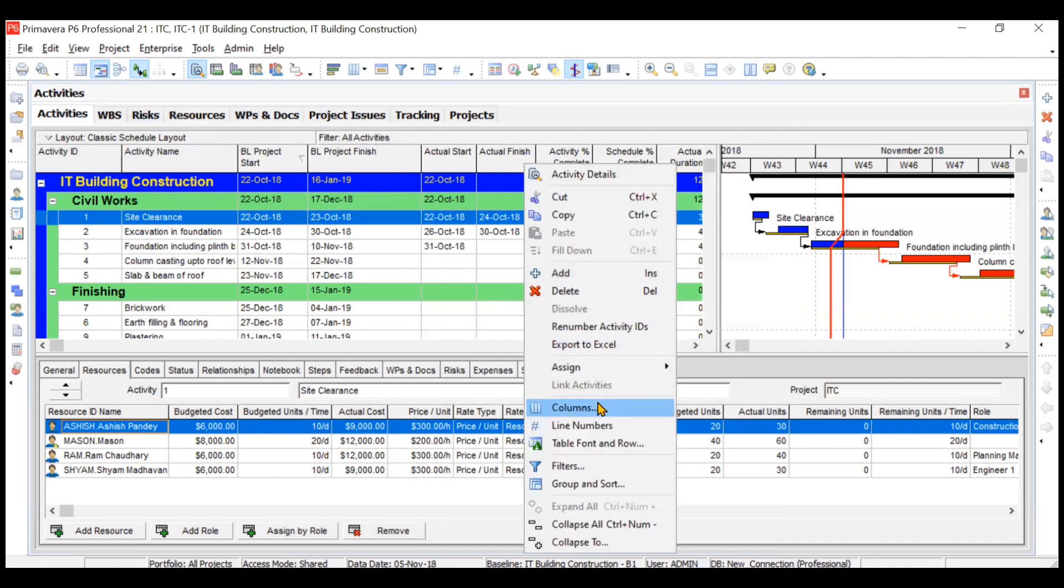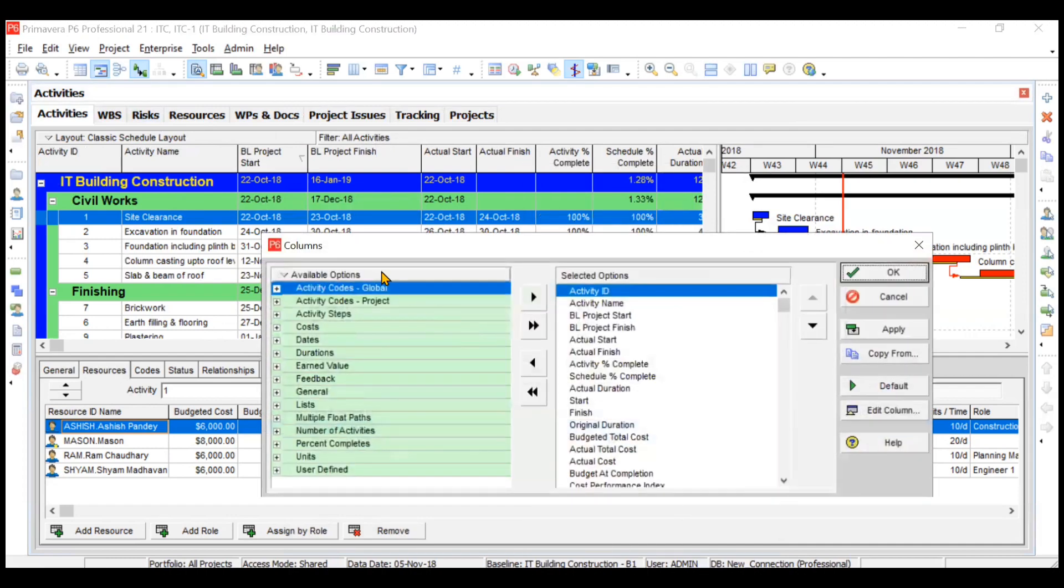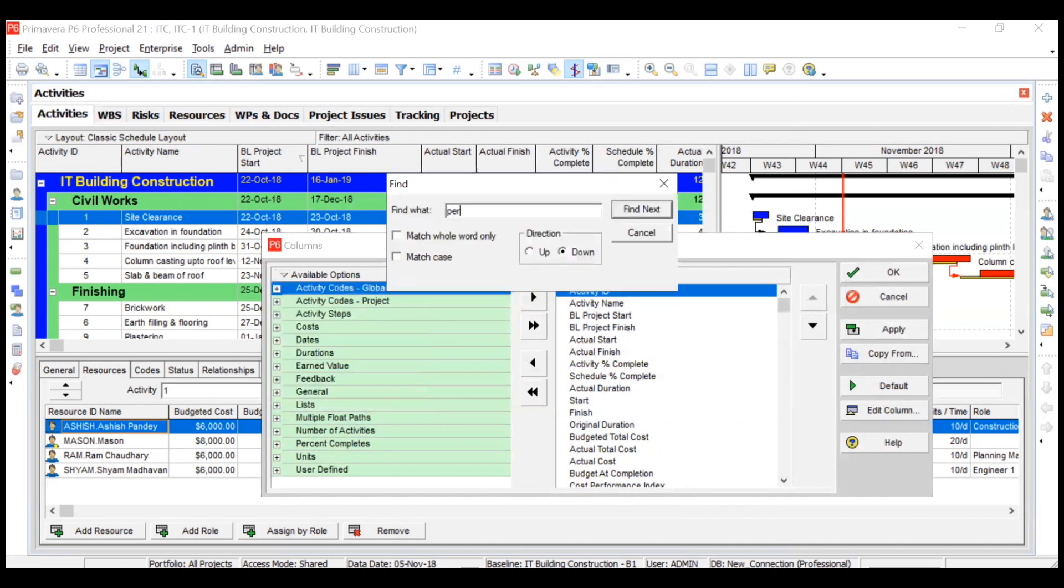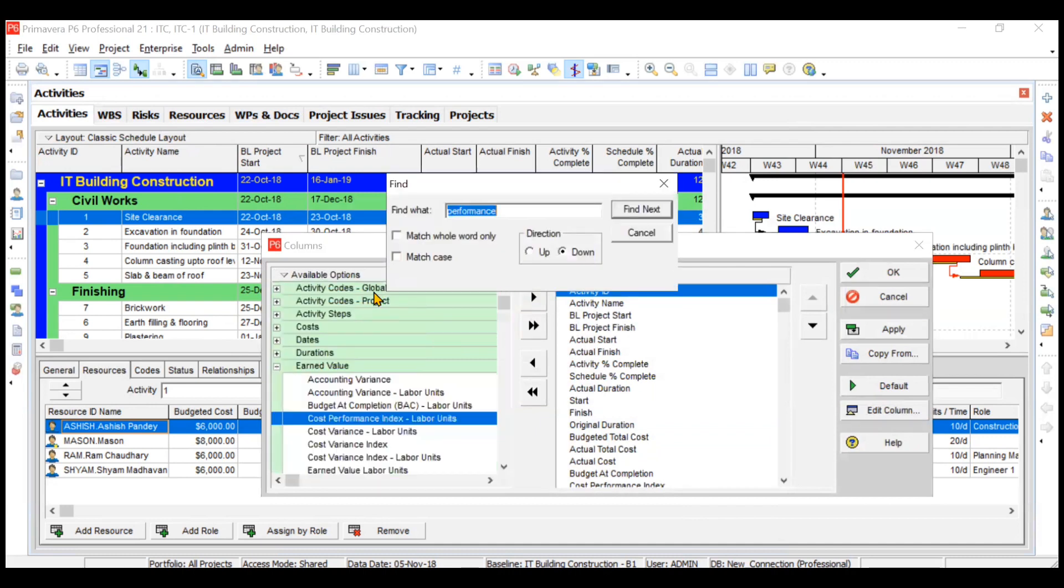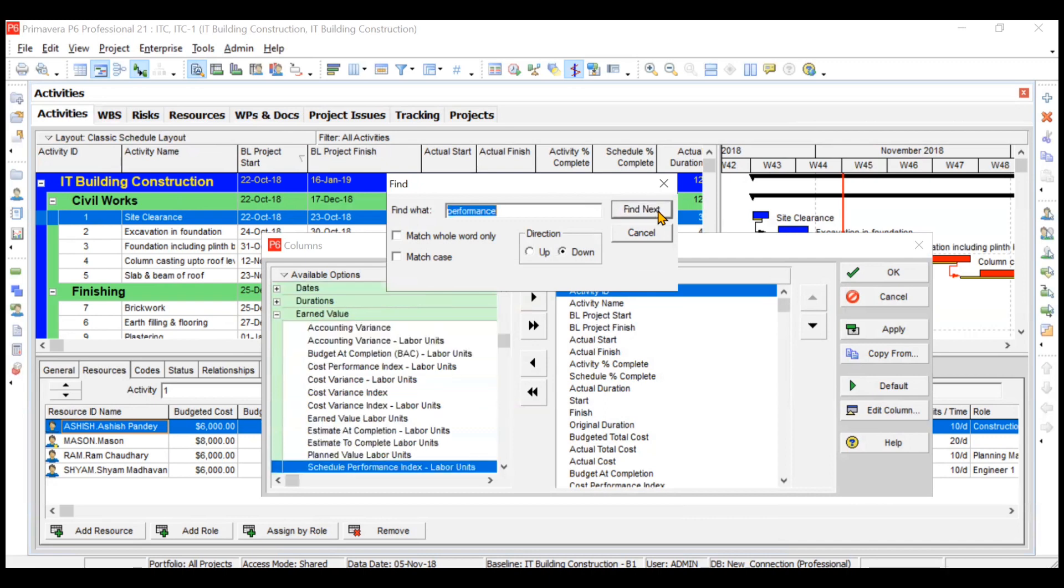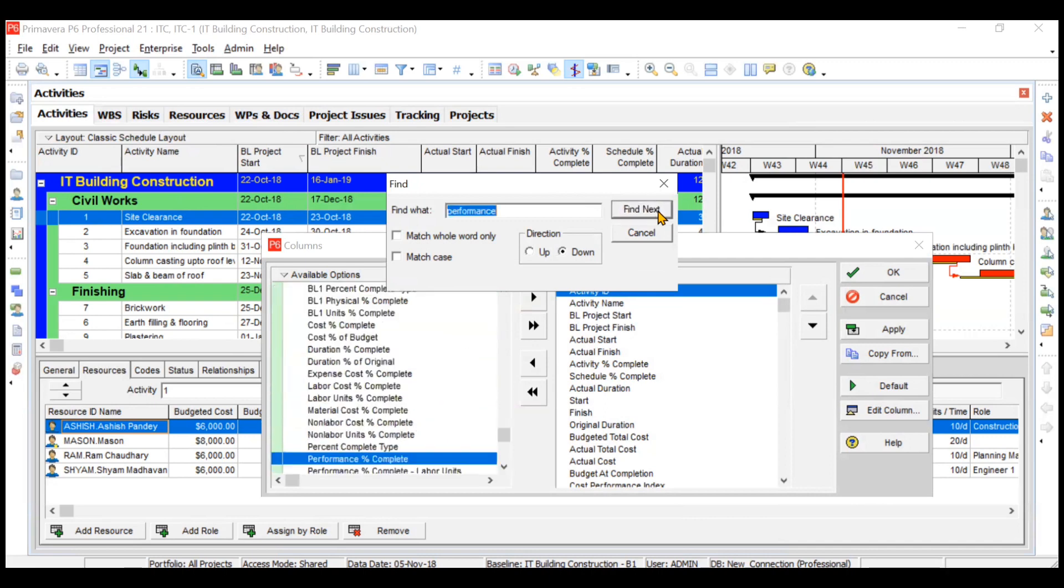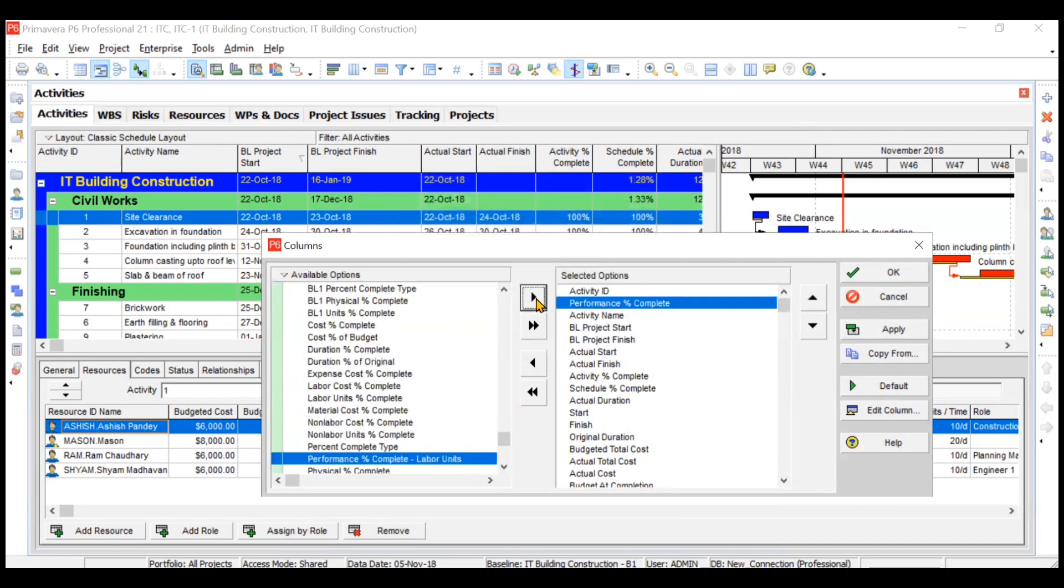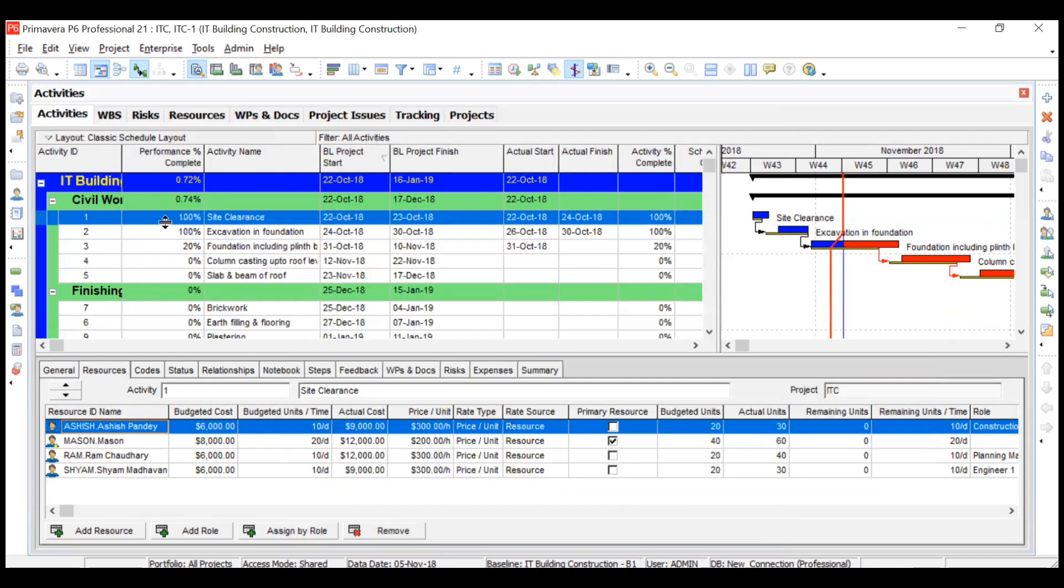You need to include performance percentage complete. If I include the column of performance percentage complete, then it will take it equal to activity percentage complete as of now. See, 100, 100, and 20, which is equal to activity percentage complete.